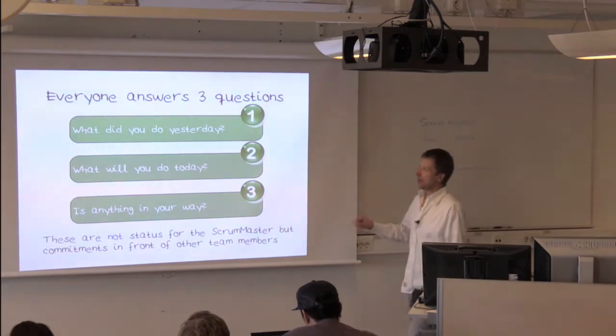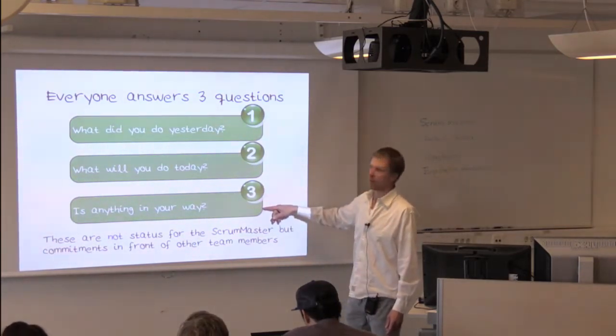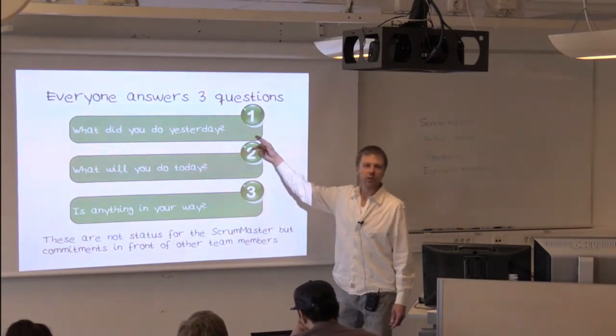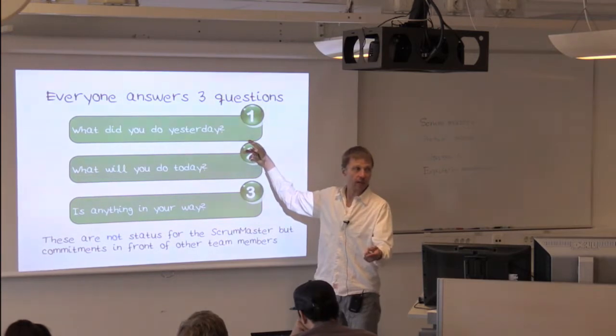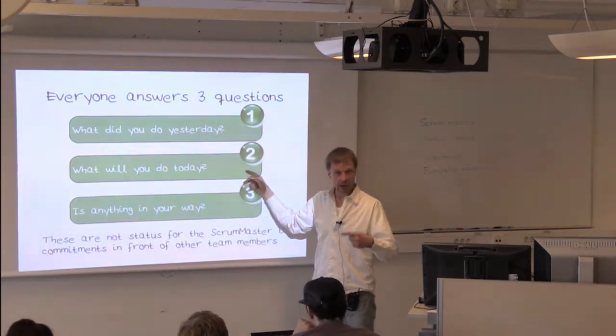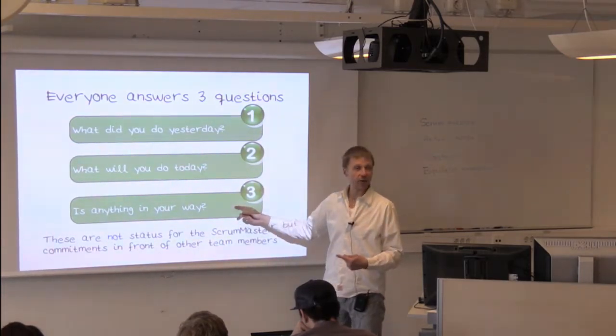In the daily Scrum meeting, 3 questions are asked. What did you do yesterday? Or rather, what did you do since the last daily meeting? What will you do between now and the next daily meeting? Is anything in your way?